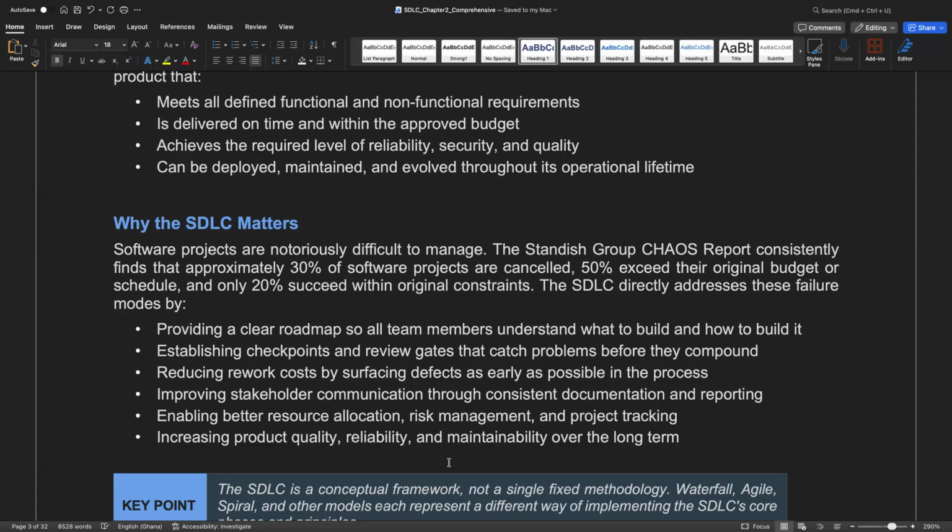Now, there is this group called the Standish Group, which produced the Chaos Reports. Now, what does this chaos report refer to? The high persistent failure and inefficiency rates in software development, which are primarily caused by poor requirements, lack of user involvement, and unrealistic expectations. Okay, so let me put this information here.